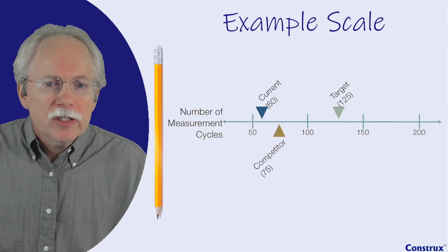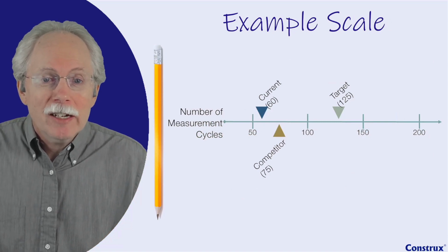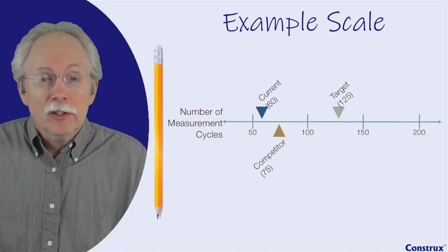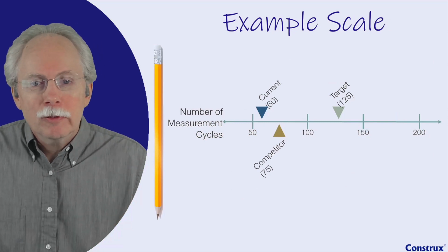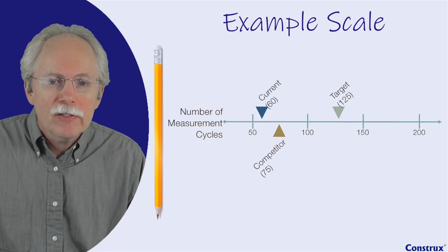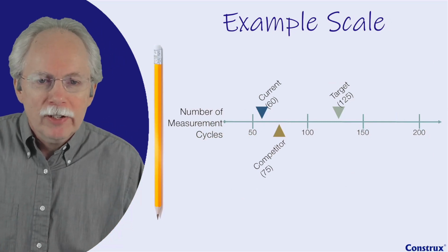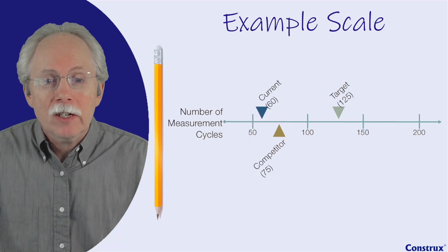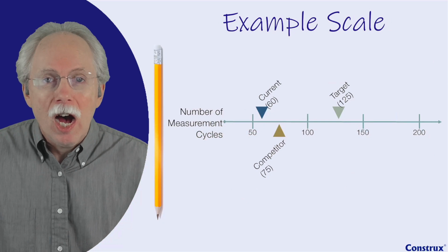And when it goes to testing, and what happened in this case, when it went to testing, it was averaging about 120 cycles per minute. And so what happened? The testing failed it because the requirement said it should average about 125 cycles. After the warning that came on, it was only averaging 120, so it failed it. And of course, the developers, when they heard that, said, we're averaging 120. Look, we doubled it. Come on.